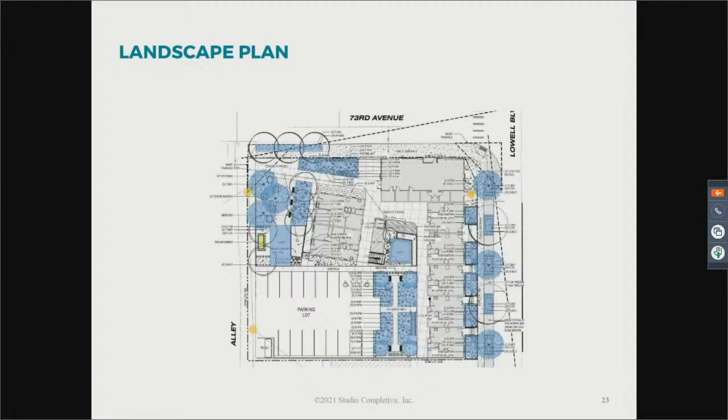Okay. Do you know when it'll go before council? Or it goes to planning commission first, correct? No. So this is administratively approvable. It's already gone to council, it's been rezoned and the preliminary development plan has been approved. So now we're just dealing with the site planning and architecture and landscape.